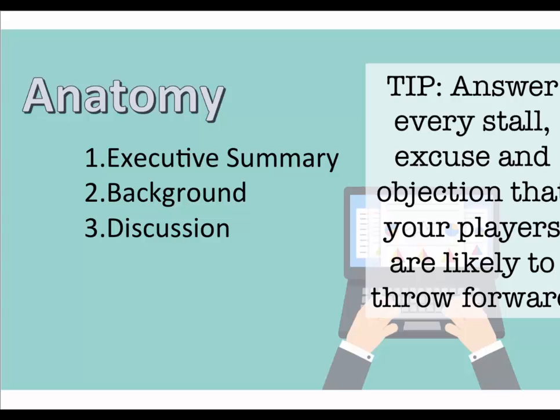You need to spell out all the assumptions because that will trigger a critical conversation now rather than midway through your project. So there's no point in saying, but how could I know that that doctor was leaving when that particular surgeon or obstetrician was absolutely critical to the success of this program? If you've assumed it, then you need to state it so that everyone can make an assessment about things that you may not necessarily know about. So it will trigger some checks and balances along the way.